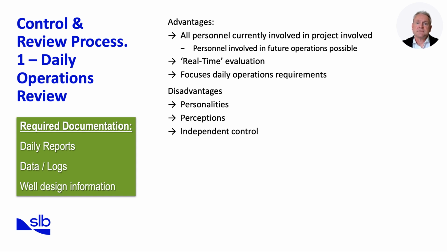For these reviews to be effective, supporting documentation is vital. Daily reports, time and depth logs, and reference to the current well design form the backbone of the discussion. Together, these records ensure that decisions are based on data, not just opinion. In practice, the daily operations review creates a running dialogue between the rig site team and office support, keeping execution aligned with the program while ensuring emerging risks are controlled. This sets the foundation for more structured reviews at the rig site and beyond, which we'll cover next.